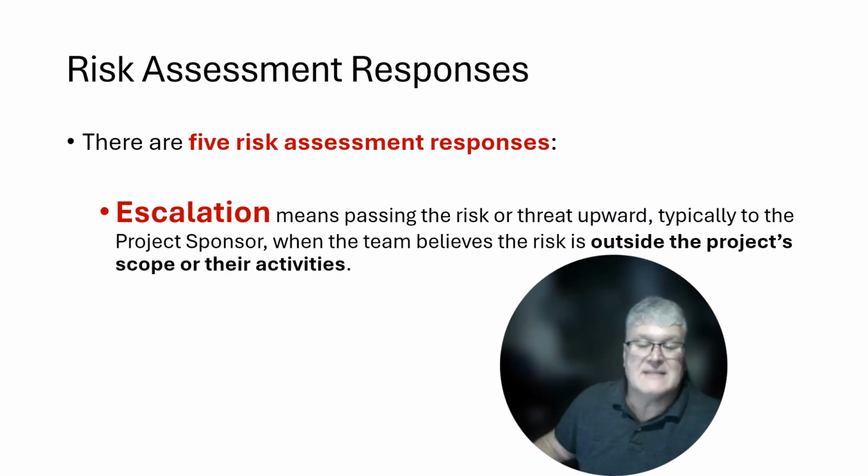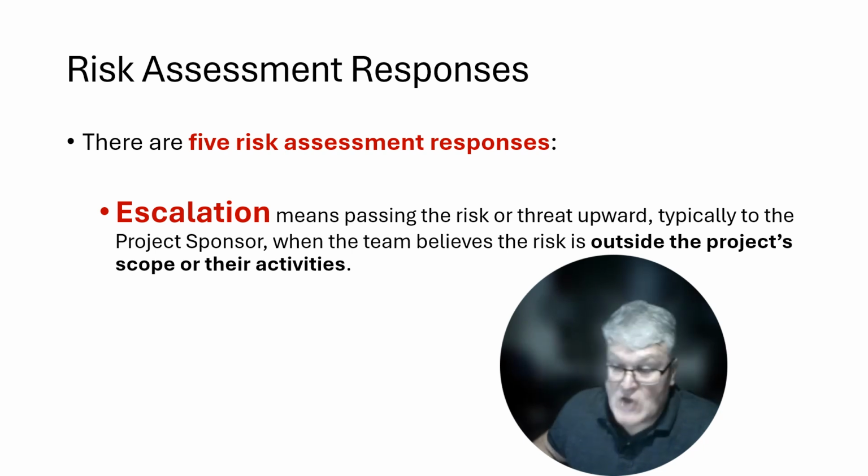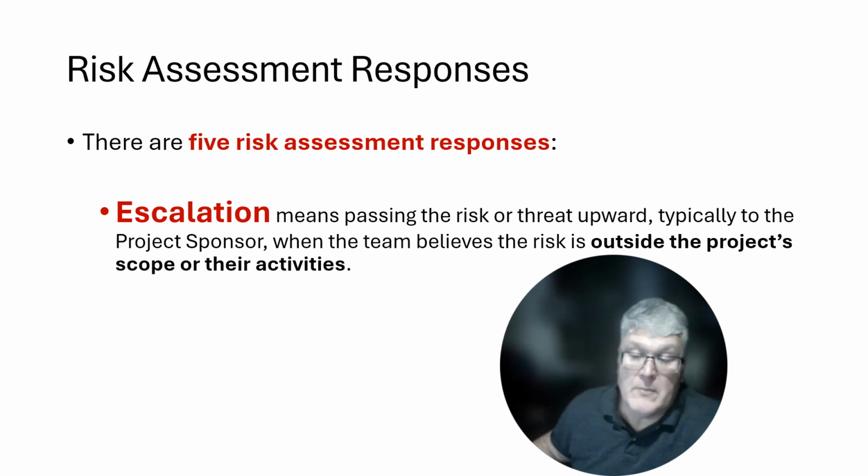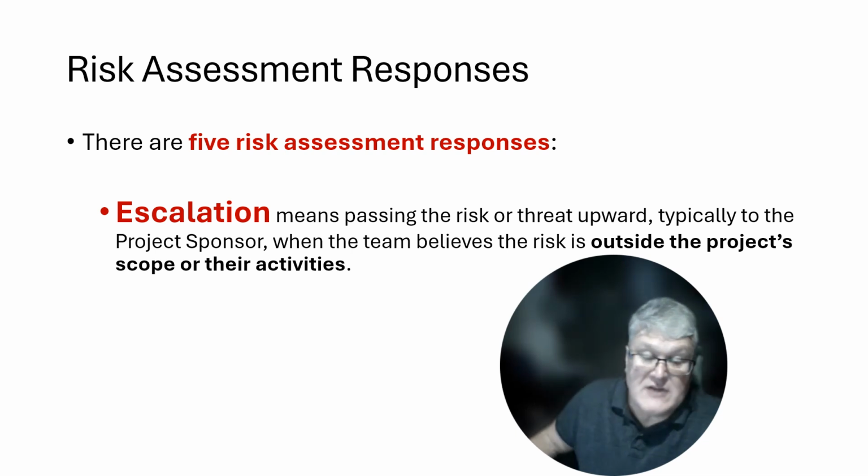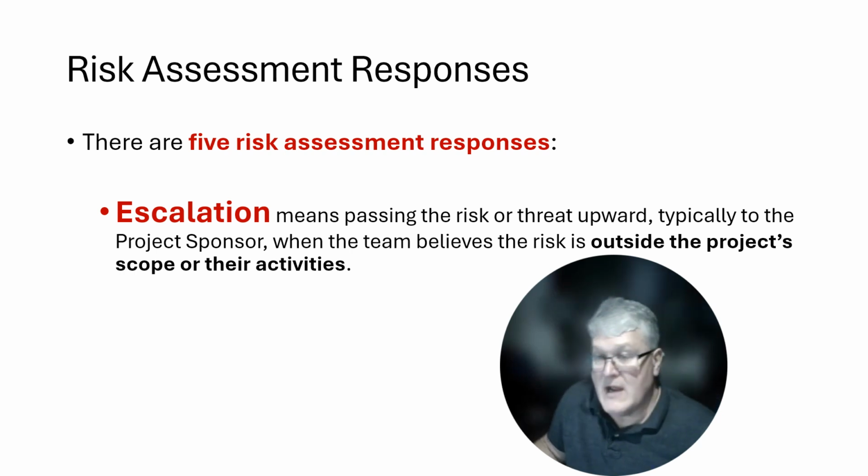Escalation means passing the risk or the threat upward. It's out of the spectrum of what you're supposed to be doing with the project management team. Likely your project management team has identified an issue that has come up. They've talked about it, at least they should talk about it, and say, hey, here's an issue here. We think this is outside of the spectrum of our capabilities. And then the project manager would likely notify the project sponsor and tell them to take care of it. When that happens, it might go to a third-party provider that would be used to mitigate that risk.